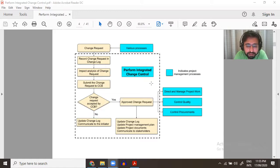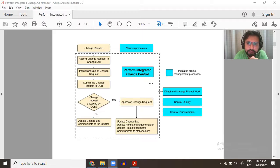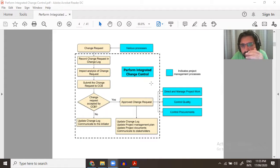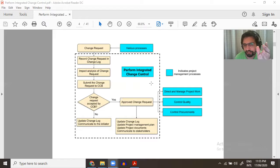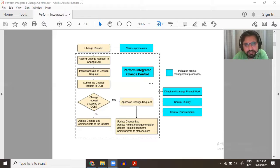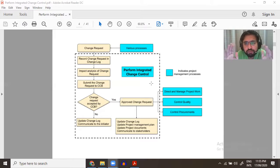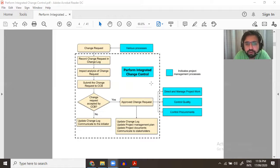Deliverables are produced in Direct and Manage Work. Once produced, they go to quality control and you get verified deliverables. Once approved in quality control, they go to Validate Scope. If accepted there, they become accepted deliverables. But if they are not approved or not verified along the way, a change request must be initiated. A change request can be a preventive action, corrective action, or defect repair. Whatever the change request, it is communicated to Perform Integrated Change Control and the Change Control Board, where we evaluate based on work performance reports.